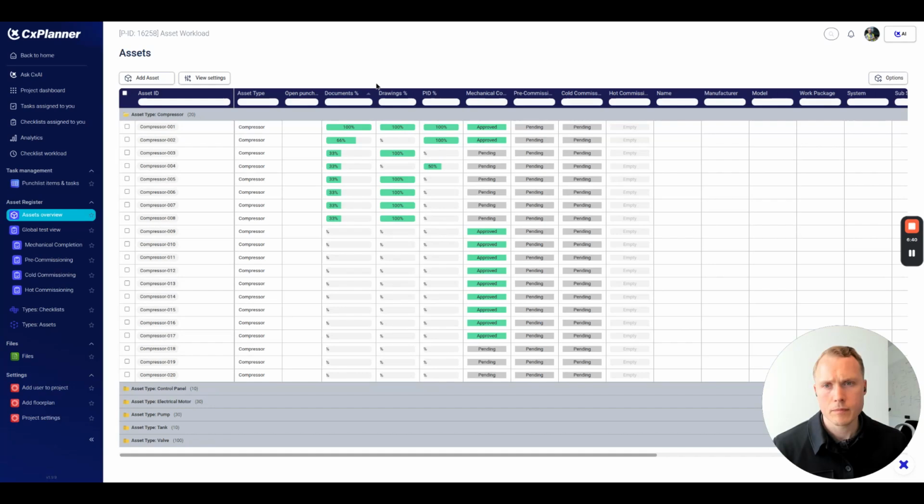So here you see you can decide you only want to have a view of like the P&IDs handover for the assets, or however you like. You can structure this as preferred. And then at the end, you will utilize our asset or system export, where it's going to generate like the turnover handover packages for you ready to hand over in this structure here.